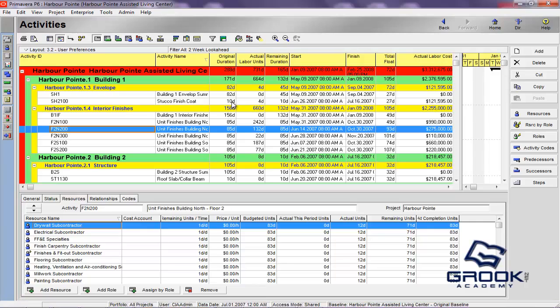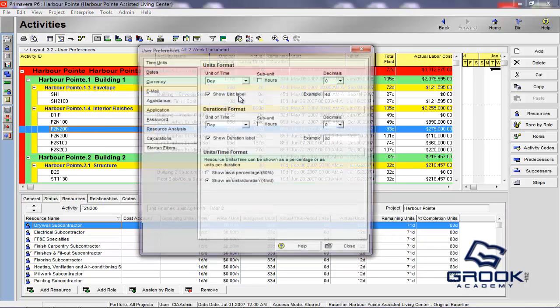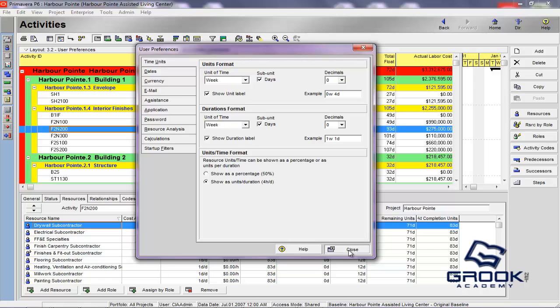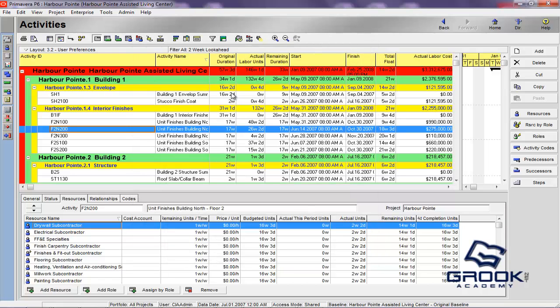So, you can now see 10 days, 82 days here for duration. And, you see zero days here for labor units. Say we make it weeks now. We have one week, one week. Subunits, four days, one week, one day. We'll hit close. And, you'll see that the units here have changed to by week, by day. So, this will apply to all durations and all units throughout the software.